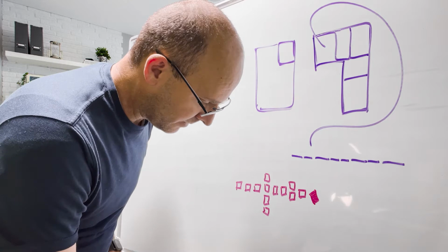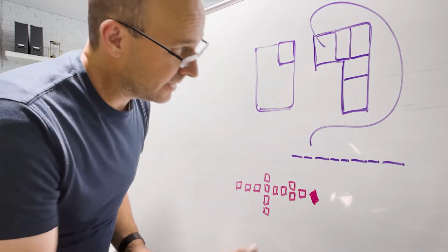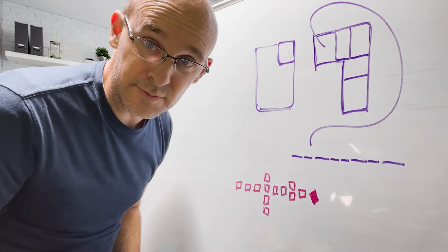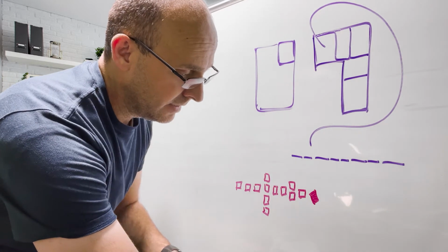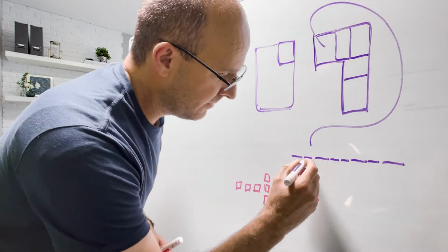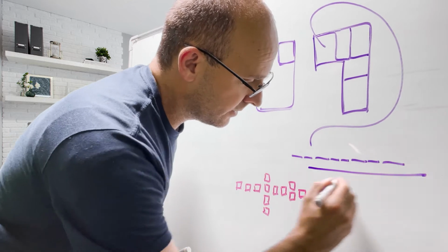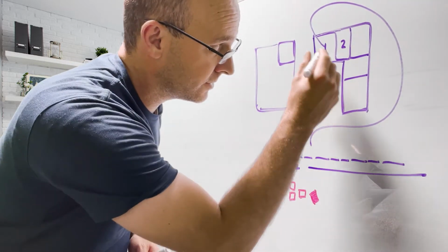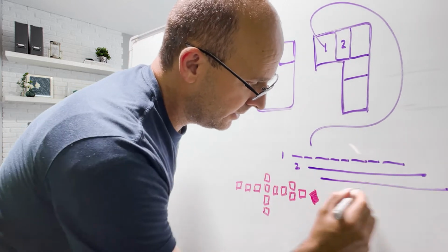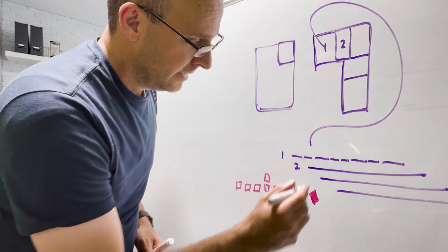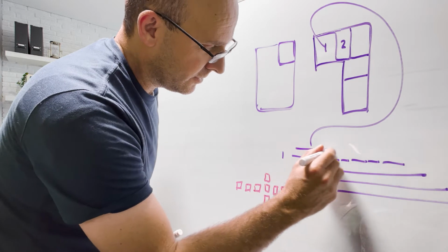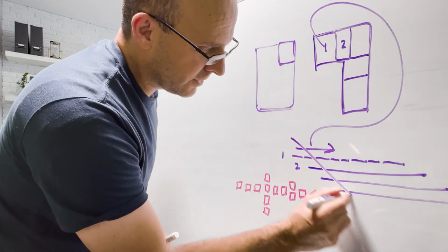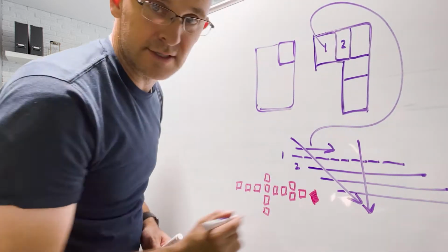What I mean by that is that to create takt trains in the first place, so that we can then see them on top of each other, there's one area and there's the other area. So there's area 1, area 2, or takt zone 1, takt zone 2, and you can see these in a flow. Like I said in the other video, you can see the flow in the area of work, you can see the trade flow, and you can see the logistical flow.